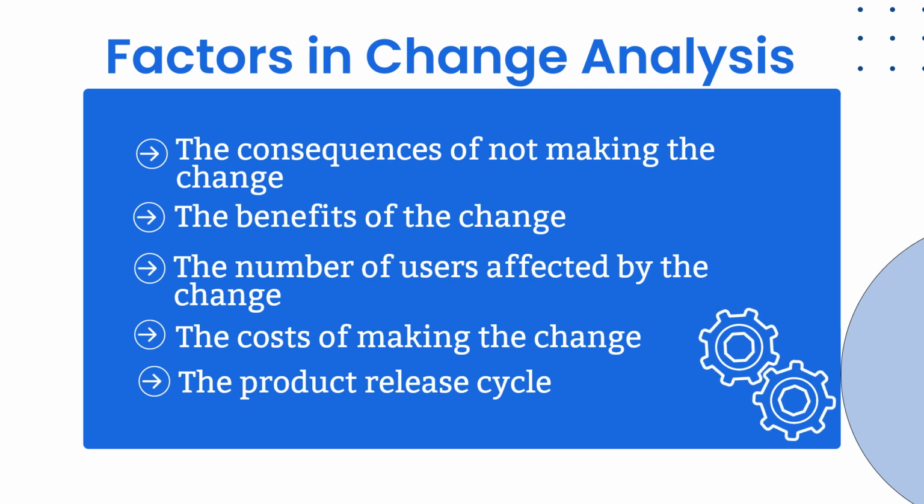The product release cycle. This factor looks at the organization's cycle for releasing new products. It evaluates whether the suggested change can be successfully incorporated into the current development cycle or whether it necessitates changes to the schedule and release plans.